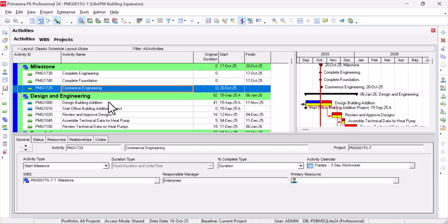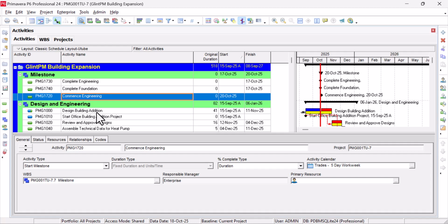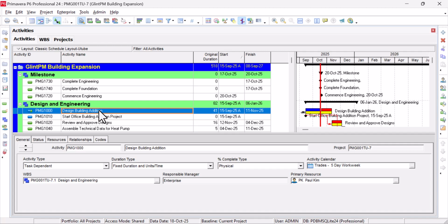What I'm trying to let you know here is most people just link the milestone like they link the activities normally. However, you should have established the logic for your schedule before you link the milestone to the activities it is connected to, or supposed to be tied to. By so doing, you'll get a good logic for your schedule.